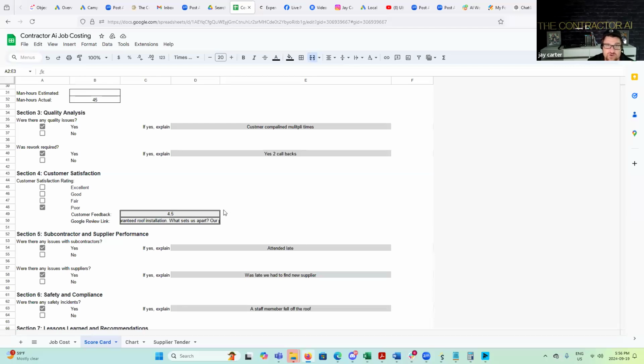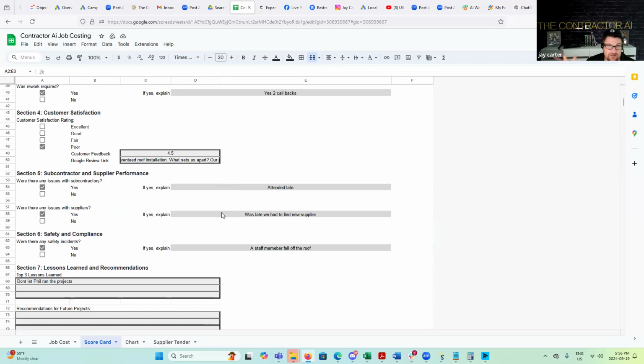This is how I'm showing you exactly how I've done it in my business. Not overly complicated. But a variance of 2% either way triggers this immediately, and it's called a job autopsy. We go into every detail, everyone that was involved: estimators, salespeople, the crew leads, the superintendent. We're sitting down, and someone's got some explaining to do.